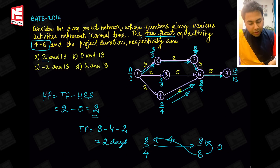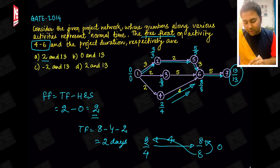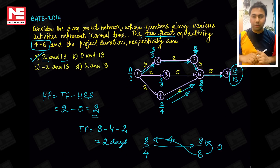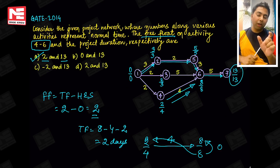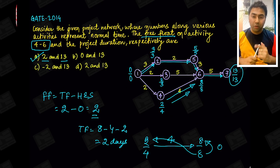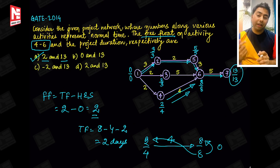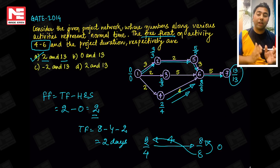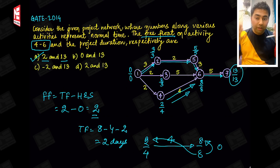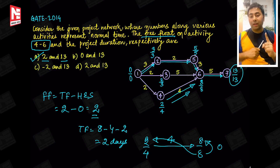Duration equals 13. So the answer is: total float equals total float. Head event slack minus total float gives you free float. And if you have tail event slack minus free float, then you will get independent float. The concept is very very clear.